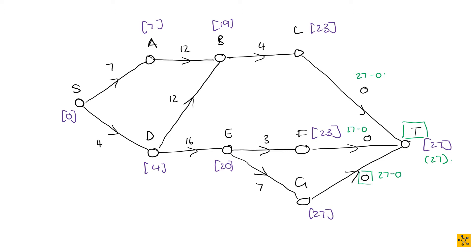So next up, we now have the latest start time for T. We take this latest start time of 27, and we're going to go to G. So you have your latest start time of the predecessor — the 27 — and you're going to minus the 7 that it takes to get to G. You want to find the latest start time for G, which means you're going to have to subtract the time it takes to actually do G. So 27 minus 7 is 20. The latest start time for G is at time unit 20.